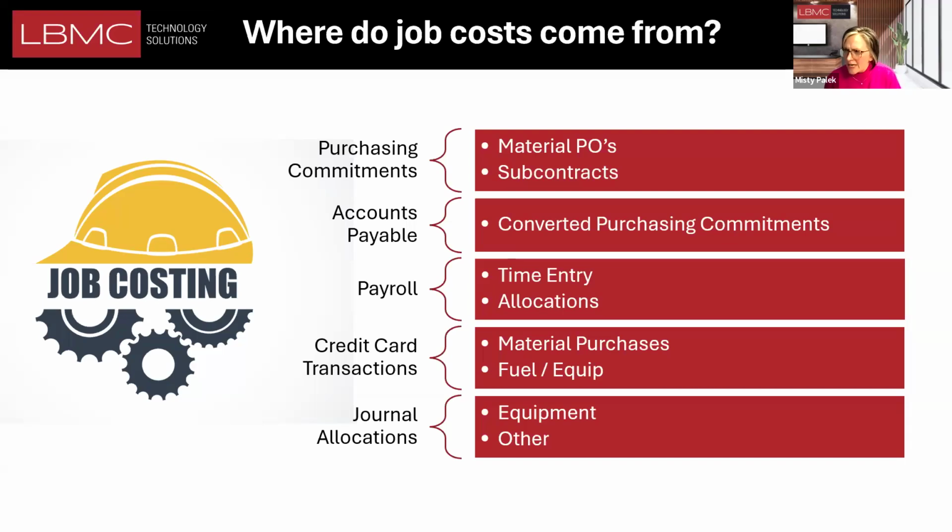It's also driven by project management, because project management needs to know on their projects how far along they are complete. You want to be predictive and say, I know that I've committed to these 5 subcontractors, for example, and all their bills total $1 million of our $10 million contract. And so if we've only received 500,000 of those subcontracts, I know that I've committed to spend another 500,000. So it's important to recognize commitments as well. A lot of people call them different things, but most of the time they're purchase orders and subcontracts.